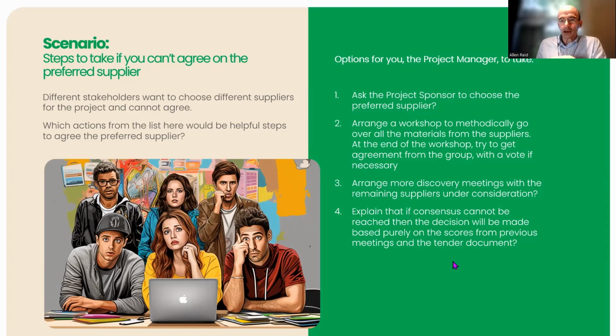So what we've got there is that essentially pretty much everyone has agreed that helpful things to do are arrange a workshop to methodically go over all of the material, keep people talking, keep people going through the content and the decision-making content. Another meeting will often help. Sometimes having another meeting with the project sponsor or the leadership team involved can get the best out of people. Explaining to people that if we can't have an agreement, then we're going to have to make a decision based on the scoring, or based on the budget or the numerical elements of the evaluation. That can help focus people's minds.